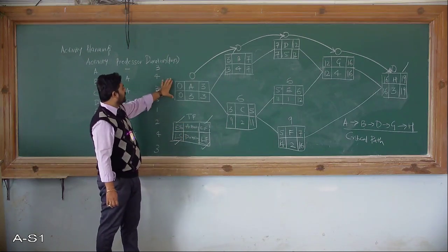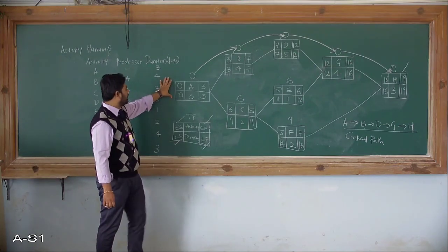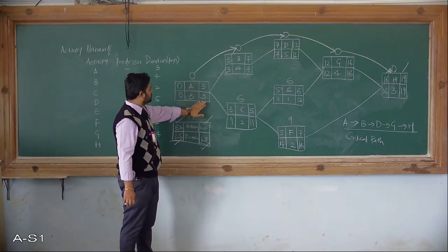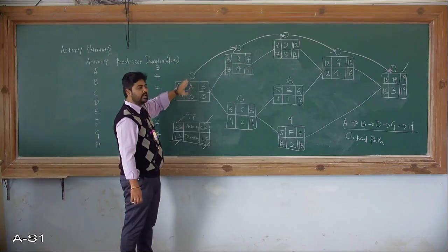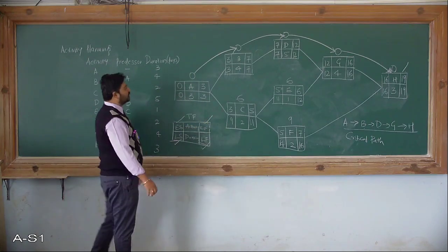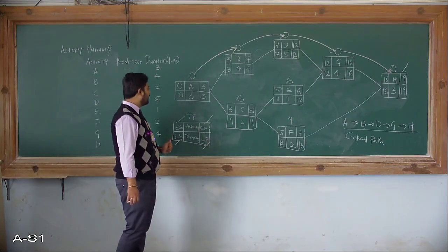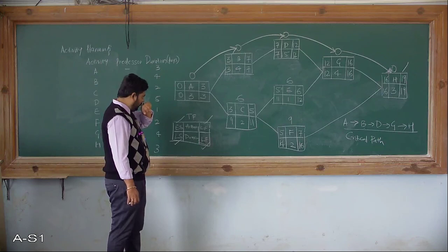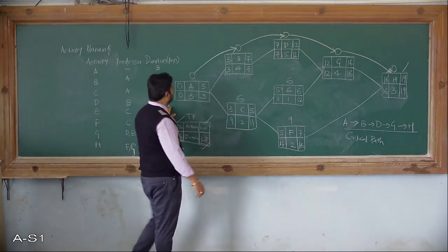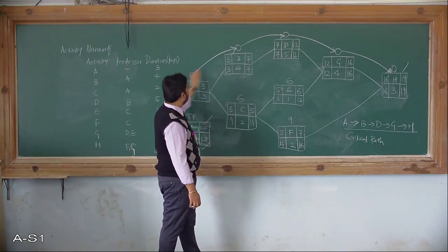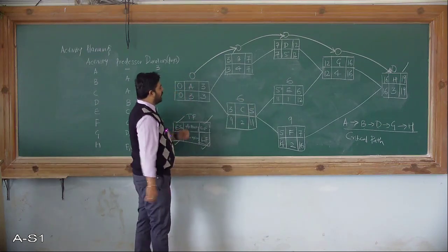If the difference between your early start and late start, and early finish and late finish, is the same, it comes to 0, and then you cannot make any changes to that particular activity. So this is the forward pass, backward pass and total float.